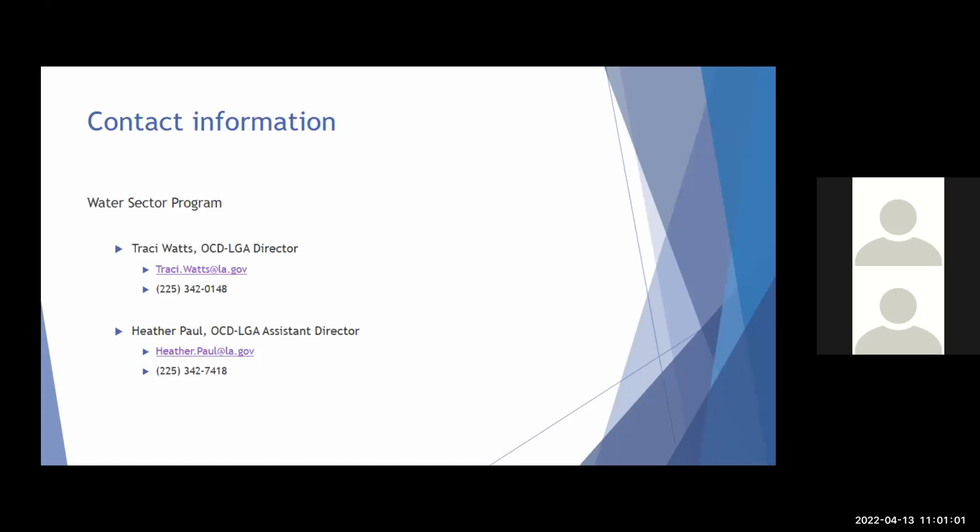The next one I answered and now I'm not sure about. If an entity has obligated its second tranche of ARPA funds as the match, but has not received those funds yet, would a resolution obligating those funds when they are received be sufficient to show their availability? I said yes, but I worried about the deadline now. Yes, send us that resolution, because we can also verify that in our system, since we were the office that provides that and we know what your payment will be. Your resolution needs to include that it was obligated and the amounts that you are obligating from those funds.